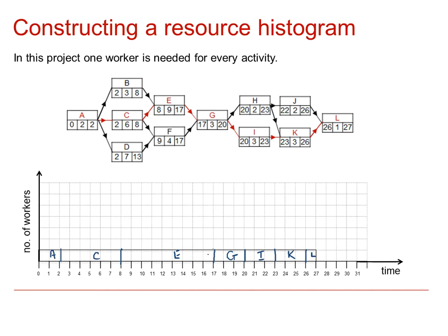Once the critical activities are on the diagram, we can then start putting in the non-critical ones. We tend to do those in alphabetical order, although it doesn't actually matter. So we can see that B can start at 2 and has duration 3. So if we put it in at its earliest time, then starting at 2 with duration 3 takes us up to time 5. And that will be the rectangle for B.